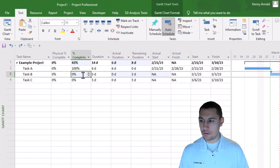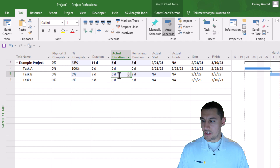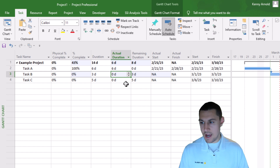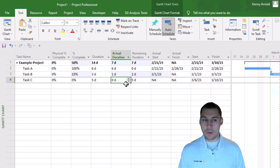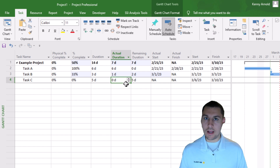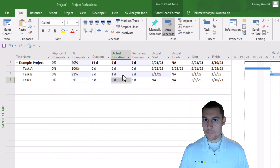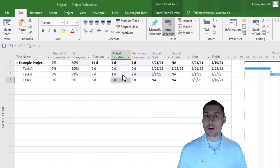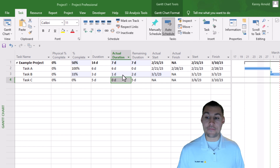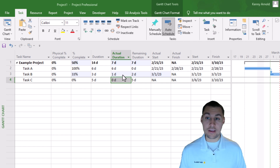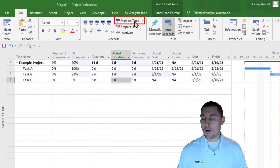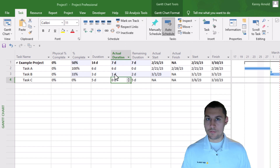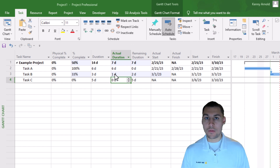Let me set the percent complete for task B back to zero and show you that if I were to change the actual duration on this task from zero to one, Microsoft Project is automatically going to calculate a value for percent complete on task B. The proper way to get the percent complete for this task would be to neither enter a value in the percent complete column nor in the actual duration column. Instead, we would want to work with our team members to adjust the start and finish dates, and then use the mark on track button. I discussed this in more detail in my last video on how to correctly status tasks in Microsoft Project.